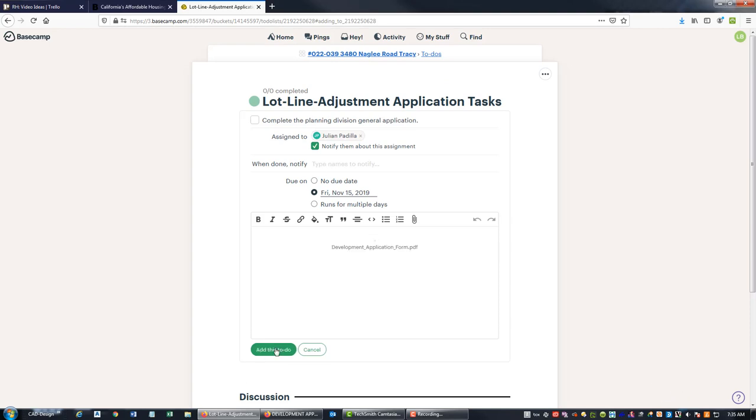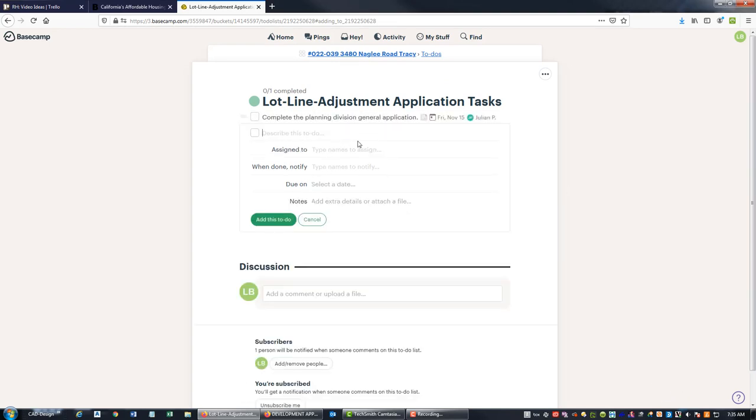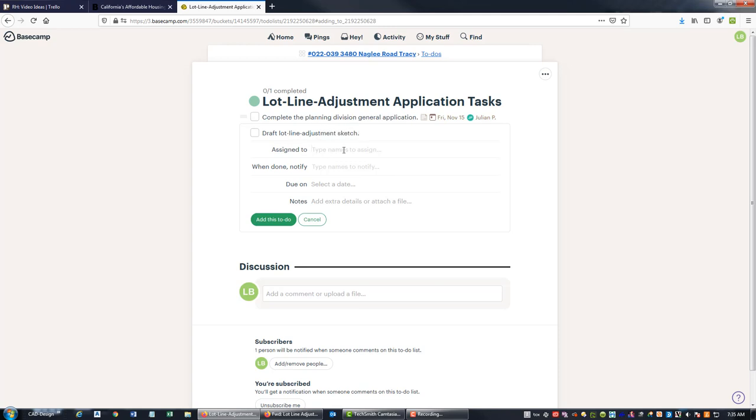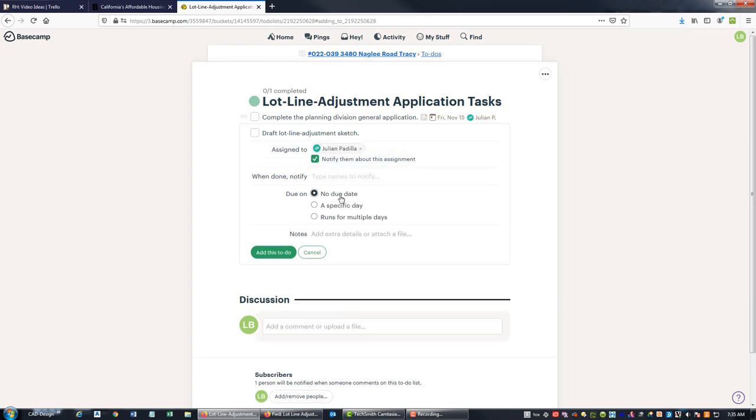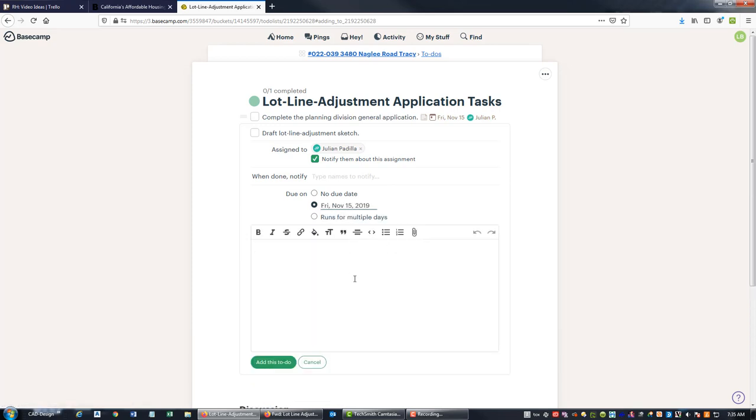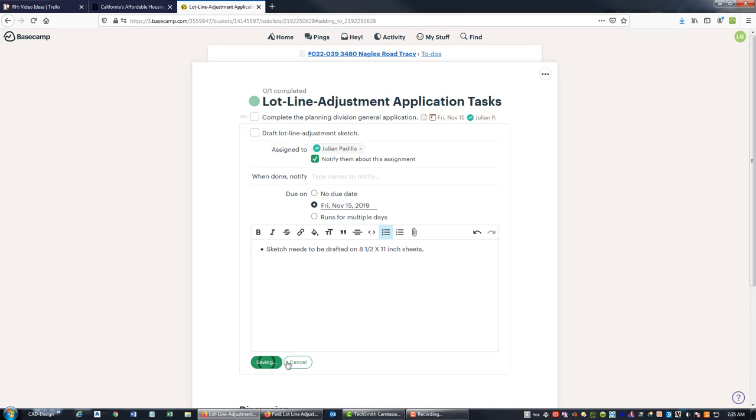Okay, so just added that. That's the very first thing we want to do. Then we need to draft lot line adjustment sketch and we're going to give this to Julian as well, and we're going to make this due on Friday. We're going to say, just a note here, sketch needs to be drafted on eight and a half by 11 inch sheets. So that's what the city requires. We'll add that.